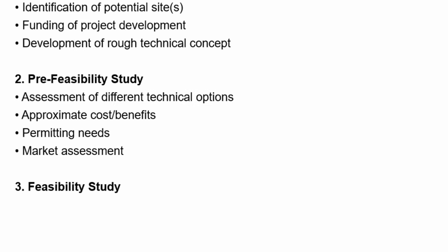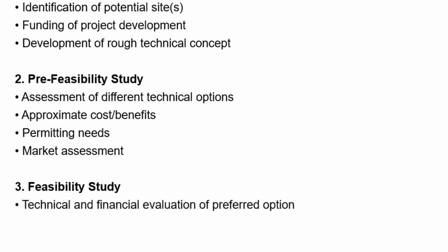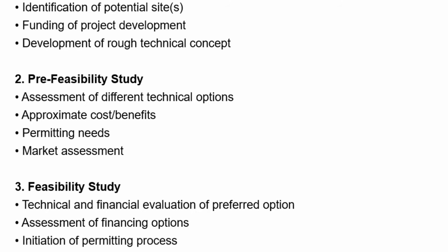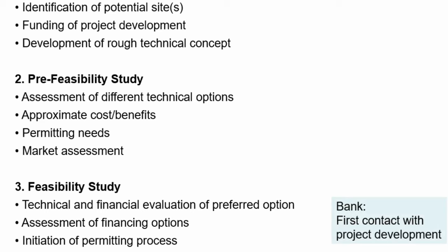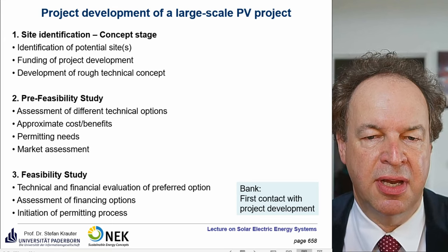Then you start really with the feasibility study — a technical and financial evaluation of the preferred option. Instead of calculating all options, you select the one that looks most promising. You have different options for financing, whether it's a loan or a mixed structure — you keep a part of the power plant or just sell the electricity. And you already start the permitting process, because this can take an enormous amount of time. Then you get in contact with the bank to tell them the outline of your project, the risks, and so on — or usually they do the risk analysis on their own.